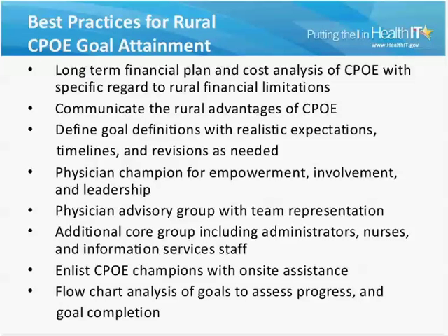So we want to make sure that we have that long-term goal. We're planning for the future. This is not something you do and then you don't have to budget for. This is a budget line item every budget going forward for things like system support, hardware updates, break fix. We want to understand what those are going forward.